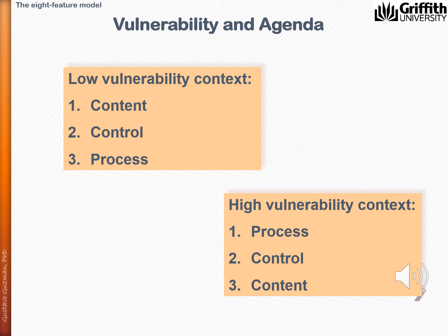That is, there is a clear what to do, clear inputs, clear outputs, and clear processes. So the content is very clear. And next, the focus needs to be on planning and control activities because budgets and time are important. And only in third place, the focus needs to be on the processes because managing this project is likely to be less problematic. As I mentioned, there's little uncertainty regarding goals, activities, sequence of activities, resources, and people's roles.